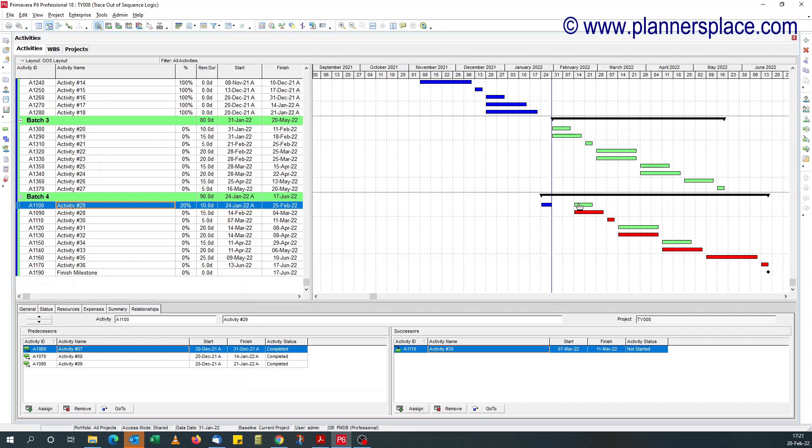So this is what I mean by, because we're using retained logic, there's an out of sequence activity within the network. And how do you trace it?